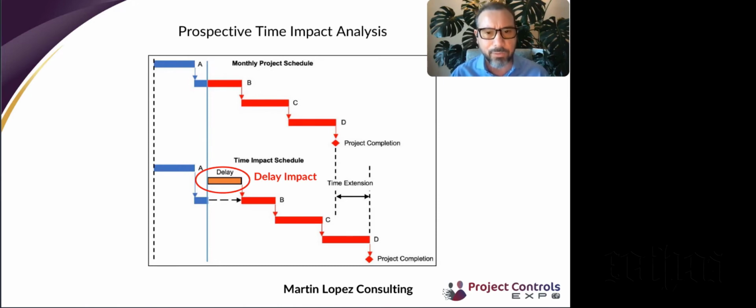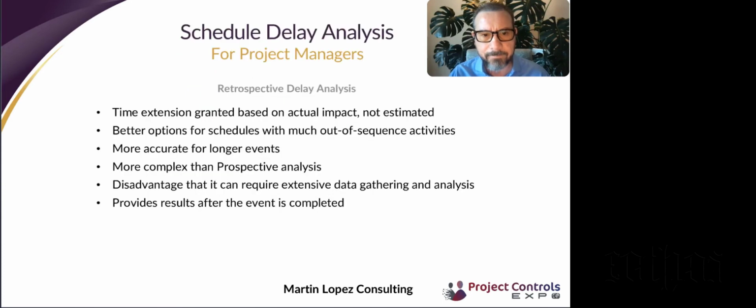And so if it's, for example, a proposal by the contractor or a wish by the owner, an analysis can be done ahead of time, ahead of the activity, and then a decision can be made whether or not to proceed with extra work, for example. So this is a big advantage of this type of analysis.